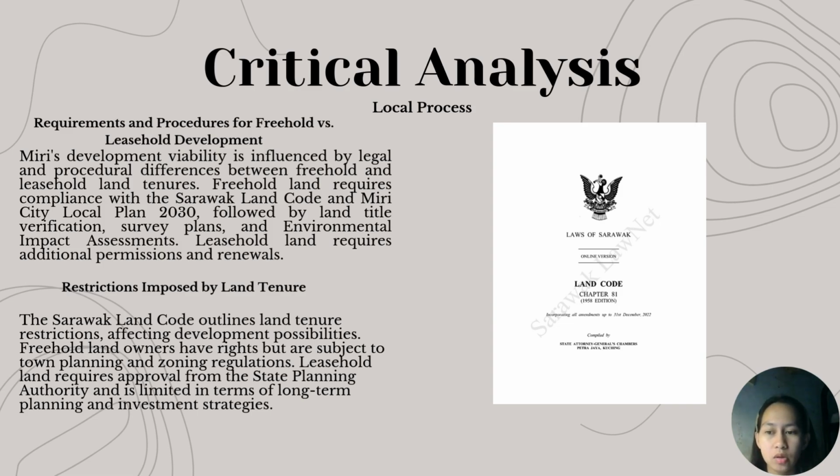Additionally, land tenure imposes restrictions that affect development possibilities. Under the Sarawak Land Code, freehold landowners enjoy ownership rights but must still adhere to town planning and zoning regulations to ensure orderly development. However, leasehold land requires direct approval from the State Planning Authority, and its limited tenure makes long-term investment strategies more challenging.